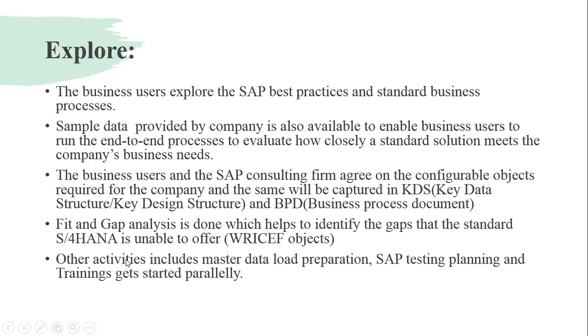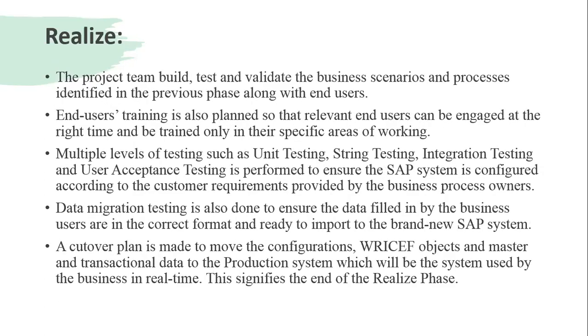Other activities include master data loading preparation, SAP test planning, and trainings can get started. Of course, the preparation has to be on top gear. Realize: the project team builds, tests and validates the business scenarios that have been put forward, and the processes identified in the previous phase, along with the end users. Of course, this is the realize phase. So configuration has been done. It is time to test these processes with both the super users and the end users.